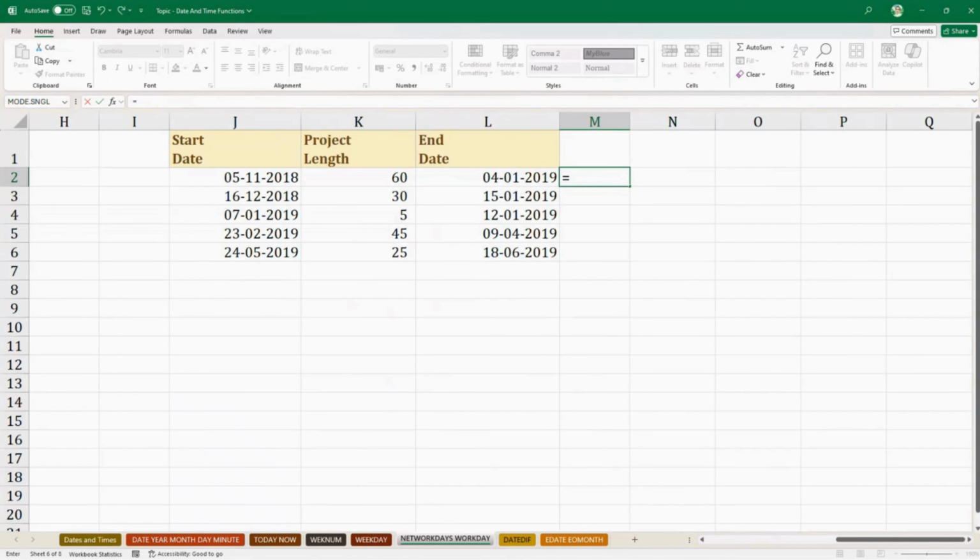Now, we have a function here called WORKDAY. And again, we got two options here, WORKDAY and WORKDAY.INTL. It adds or subtracts working days from a start date. It skips weekends and holidays. It is ideal for project planning, delivery estimates, and task scheduling. Like a sibling, WORKDAY also evolved and introduced WORKDAY.INTL, allowing users to define custom weekends.